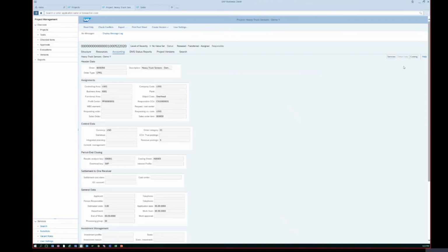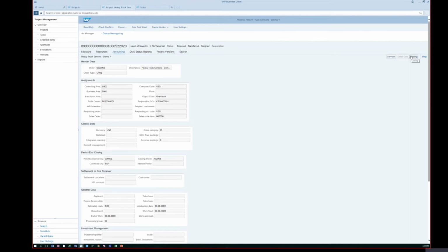And now if you go to the data, then we see here 5 hours. So we have assigned tasks. We confirmed 5 hours of actual effort. And the planned cost got reduced because we confirmed that amount of hours. So we were very efficient: instead of 12 hours, we finished the task in 5 hours. That brought down our planned cost, and the actual cost is 500.